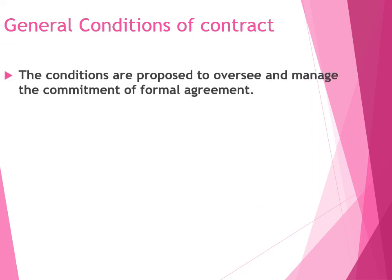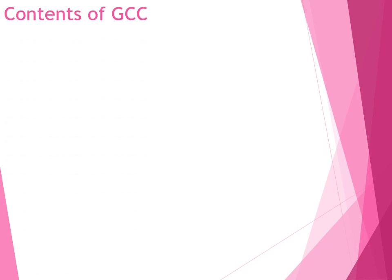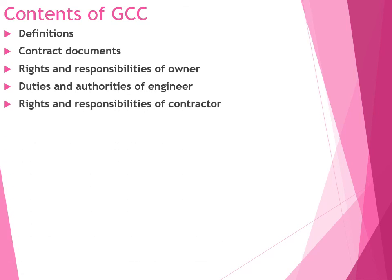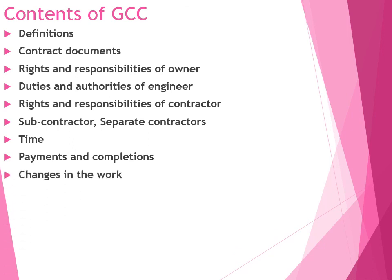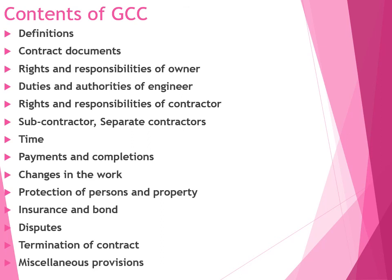General conditions of the contract are proposed to oversee and manage the commitments of the format agreement. The headings and points included in the various assignments of GCC show a certain similarity of topic. Comments of GCC include: definitions, contract documents, rights and responsibilities of the owner, duties of the engineer, rights and responsibilities of the contractor, subcontractors, separate contractors, time, payments and completions, change in the work, protection of persons and property, insurance and bonds, disputes, termination of the contract, and miscellaneous provisions — all part and parcel of the general conditions of the contract.